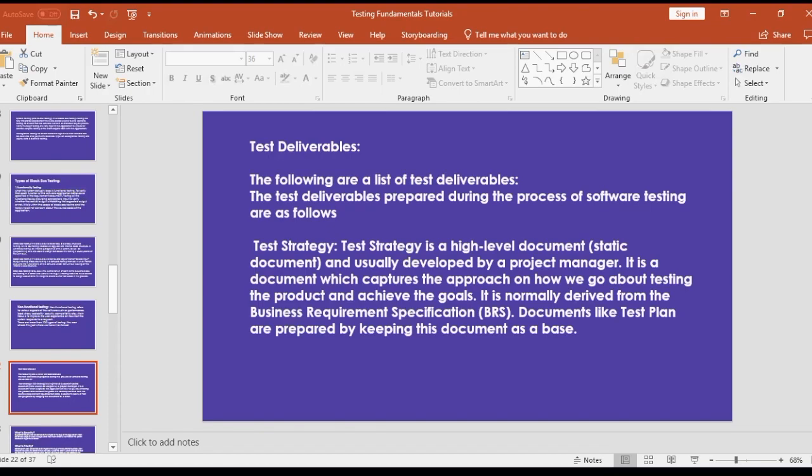Say, for example, you are building a massive house. What are we testing? Are we testing the house and the content, or are we just testing the house without the content? So your in scope will be what you are testing. Your out of scope, oh, I'm testing this house, I'm not testing the garage, and I'm not testing the front garden, something like that. So your in scope will say what's in scope of that test. Your out of scope will say, no, we are not testing this functionality.